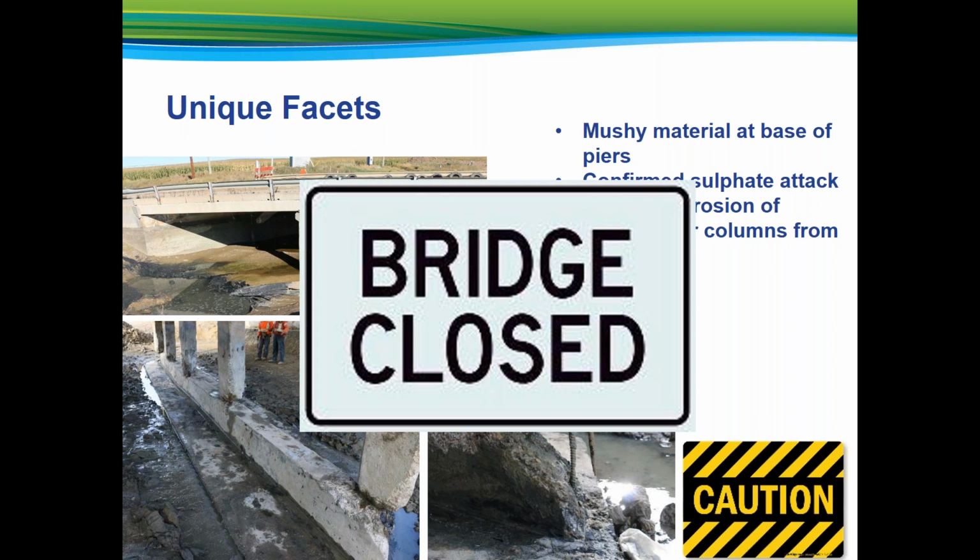Based upon the findings at M144 bridge, WSA investigated a second bridge further down the M1 canal that was scheduled for rehabilitation in fiscal year 2018 to determine if sulfate attack would be an issue with this rehabilitation as well. Sulfate attack at the second bridge was noted, but only to a minor degree. This information was incorporated into the following tender package.